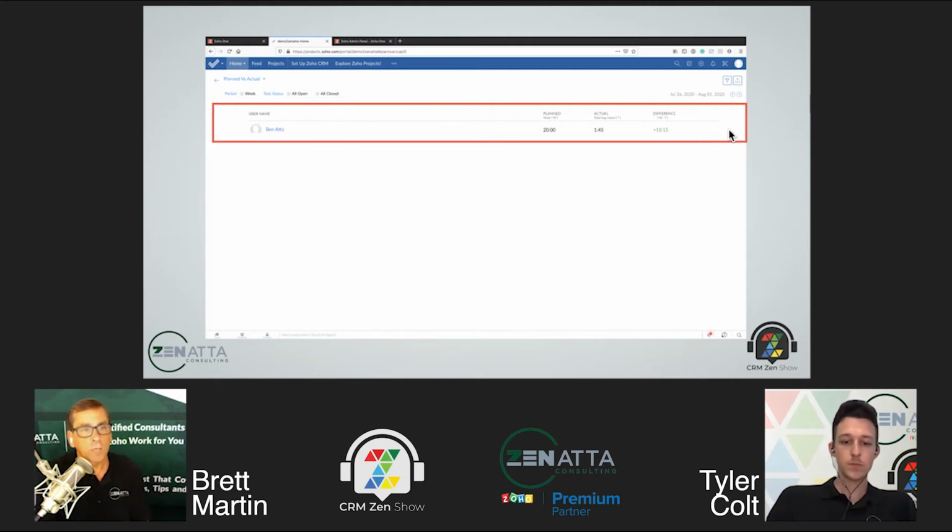But as you're looking at this in real time, you can kind of see, if you've broken all this down, how much time you thought it was going to take people to get something done as opposed to the time it actually took them. And if you're on a billable hours type of project, it can be really important that you hold to what your overall estimates are, especially if you're working on something where it's fixed bid. You can see if you're going to go over bid, under bid, those kind of things. So it really gives you nice little details as to what's happening there.